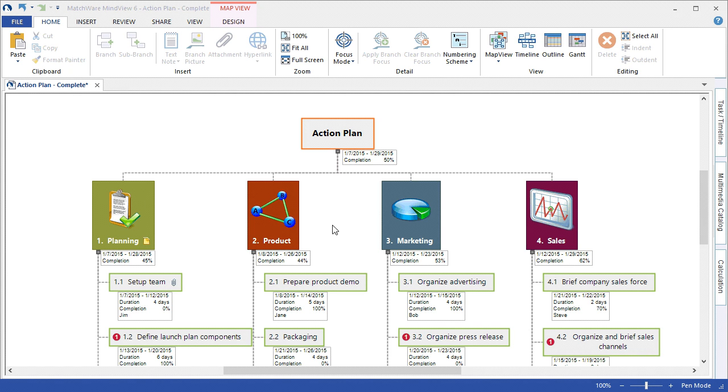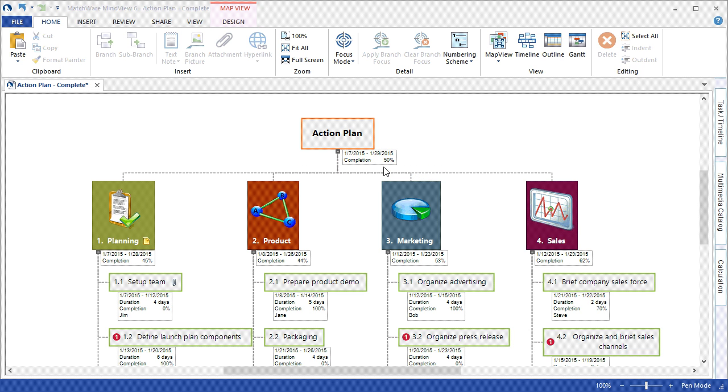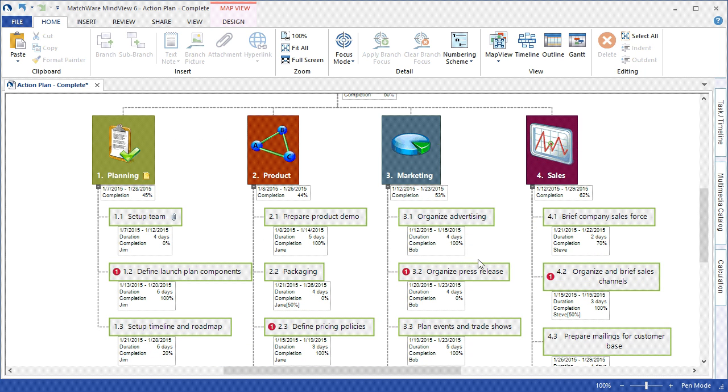With each individual item being listed in the WBS, the tasks rolling up their task information to their parent branch or deliverable, as well as the deliverables rolling up their task information into the root. As you can see, the global overview of the 7th to 29th, and currently we're at 50% completion of the action plan based on the task updates and information for each individual task item.